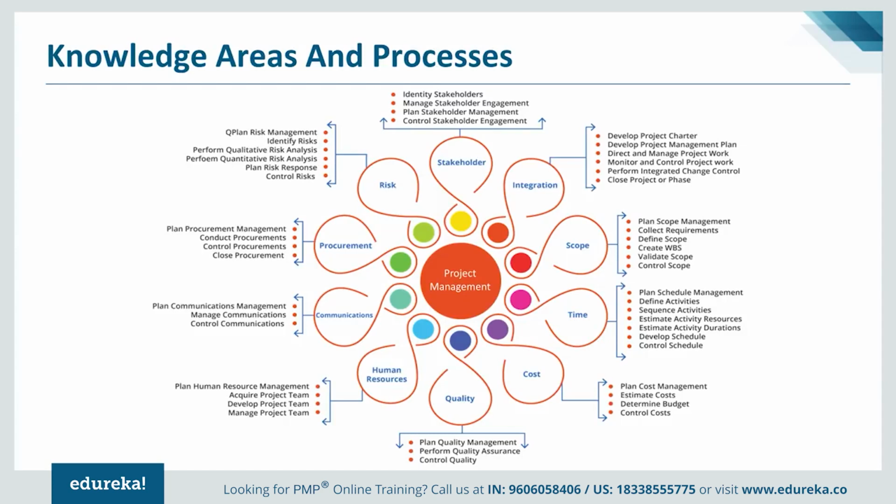And the last but the most important one is the stakeholder management. This is where we capture how are we going to identify stakeholders, right? And how are we going to manage the stakeholders effectively? So different stakeholder management strategies need to be captured over here in terms of stakeholder engagement from the point of view of power and interest, right? So from the point of view of influence of the stakeholder and how much power the stakeholder has, etc. So you create those grids and you try to control your stakeholders through those grids.